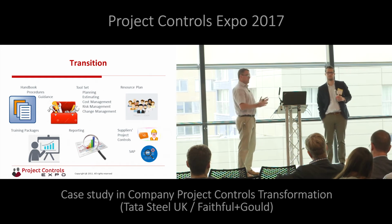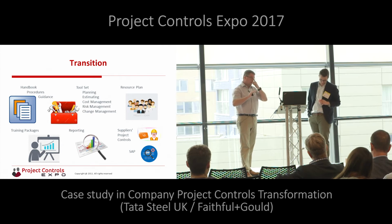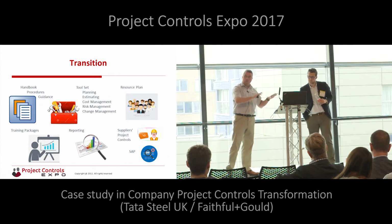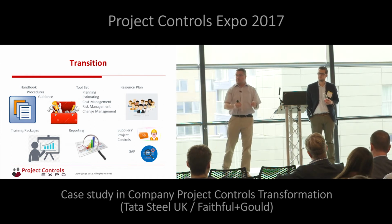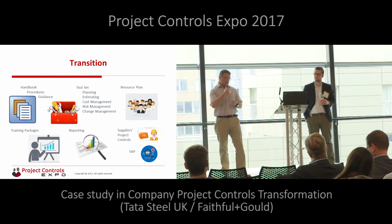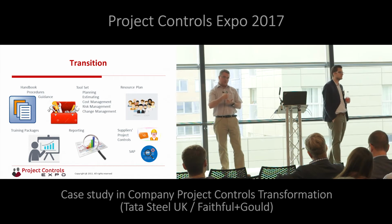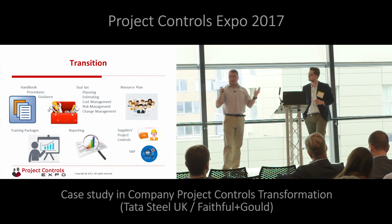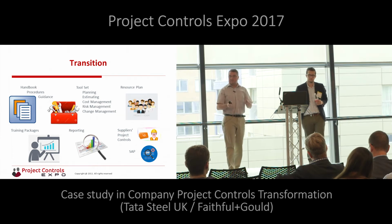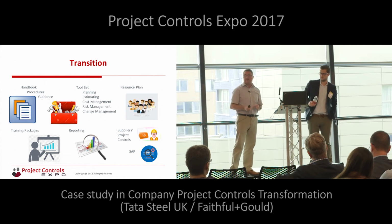So as well as the documentation, the procedures and the tools to be used within Tata, we've got a mini version of that, which we use with the supply base. So it goes out with the tender inquiry, what we expect from them. We expect a schedule baselined, cost loaded, so that they can also then report earned value. We want a standard cost report that we've got laid out, so it's showing us all the things that we need to know. So it's a mini version of that.